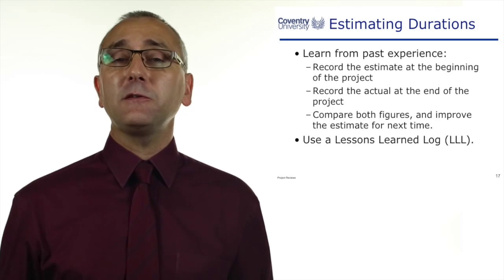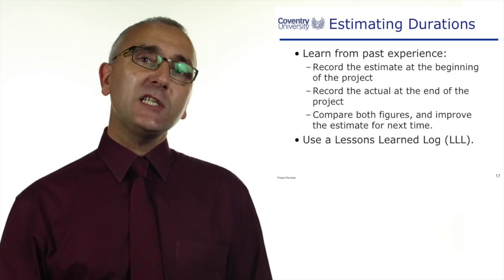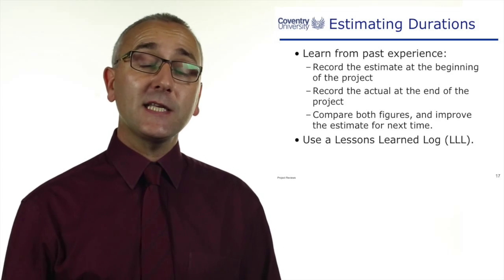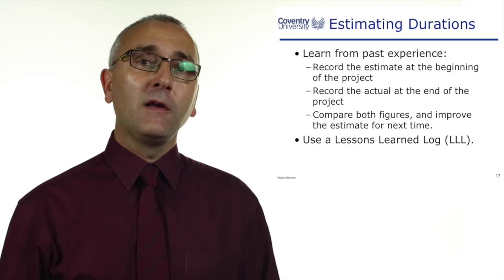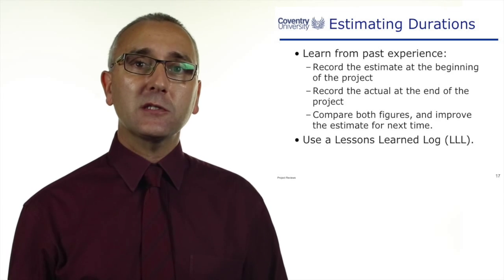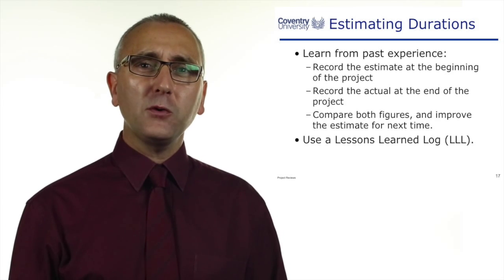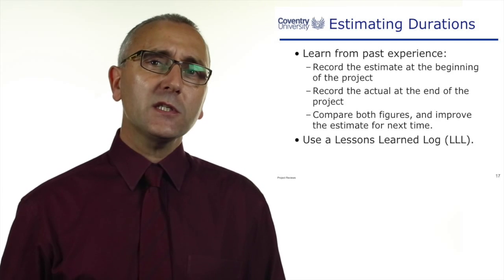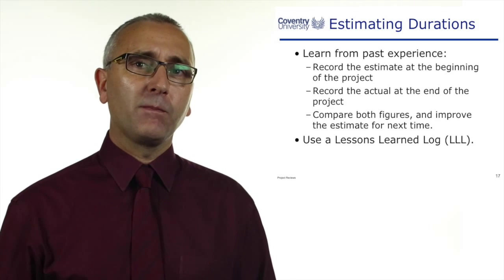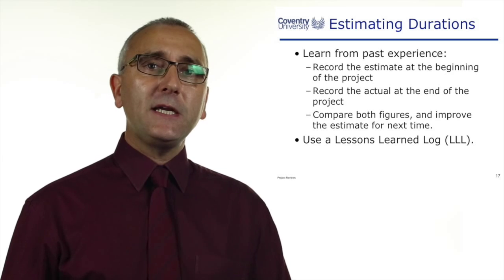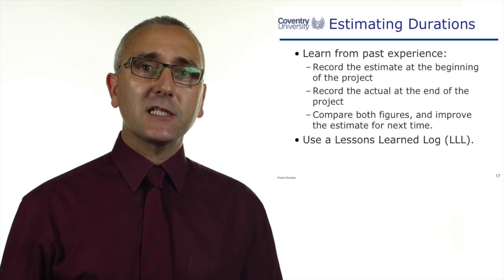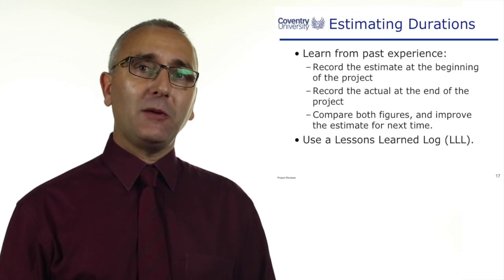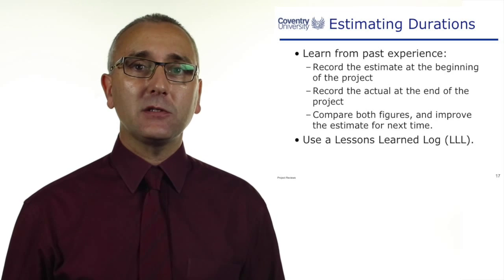And there's going to be a difference. This is where we sit down and look at the differences in our project plan, and we say to the staff: you estimated 20 hours, you actually booked 40 hours — there's a variance of 20 hours. Why was that? What can we learn from this? If this is a runner-repeater type project and we're going to be doing that task again, we want the next project plan to have a better estimate.